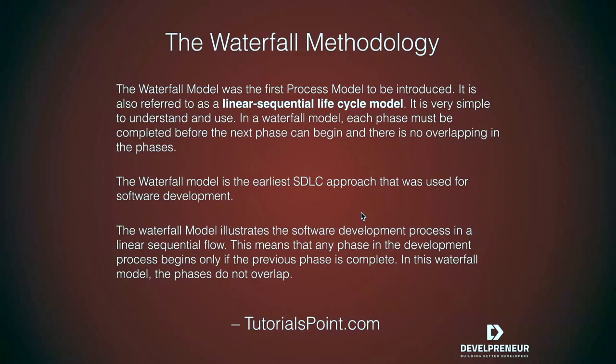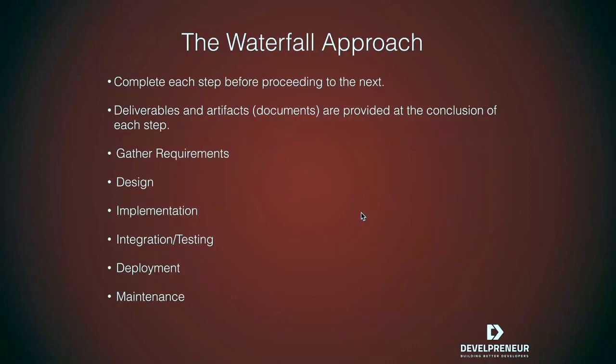That's part of waterfall. It's a very clean, stair-step approach where you completely finish one step and then you move into the next one. You don't have an overlap in the phases. And that has its strengths and its weaknesses as well. And of course, as part of completing each step before you move on to the next one, there are some deliverables or artifacts or documents that are going to be the demarcation of completing that step, because that documentation really feeds the next one.